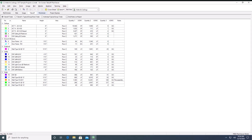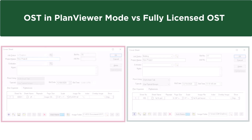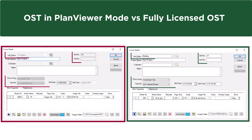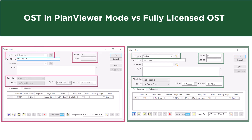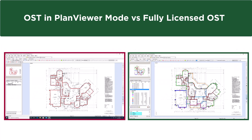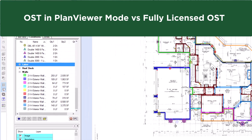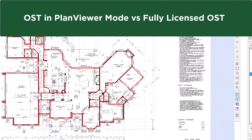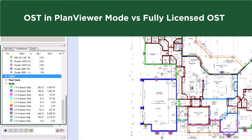What are the advantages of a fully licensed version of on-screen takeoff versus Plan Viewer Mode? A full license of on-screen takeoff allows you to add more detail to a bid, such as job statuses and bid areas. A full license also allows you to create conditions to take off a wide variety of items on a set of plans, not just one-at-a-time measurements. These conditions can be saved and reused on additional bids, so there's no need to recreate commonly taken off items repeatedly.